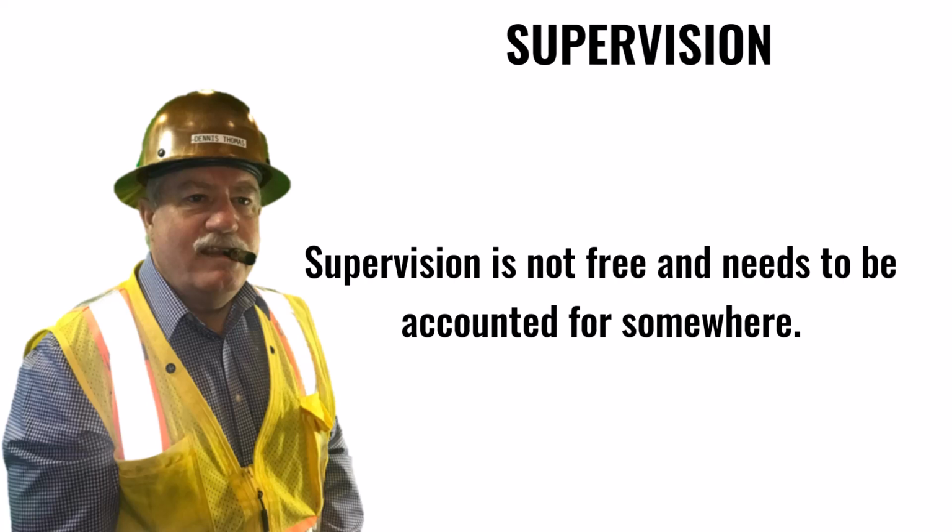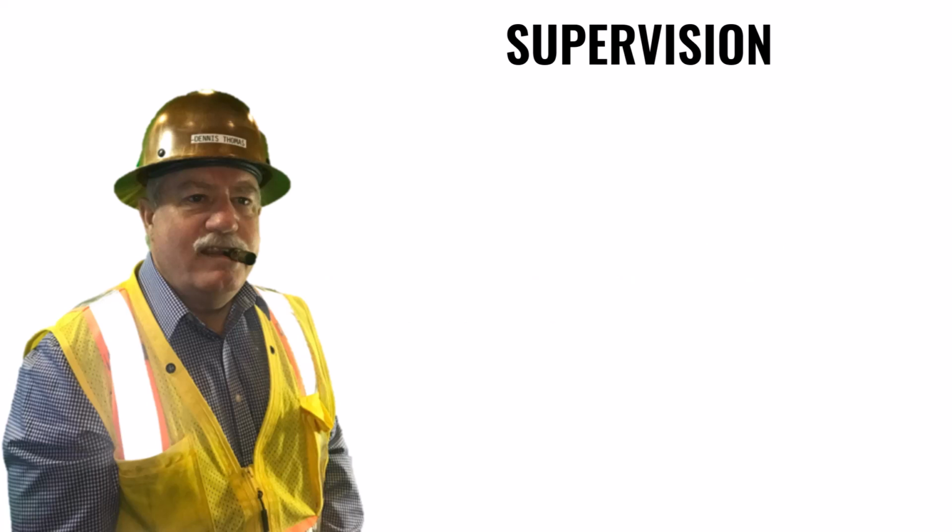Some companies include the cost of supervision in overhead by just including the supervisor's annual salary in their overhead calculation or a portion of it. Others add it to the direct job expenses as a budget based on the labor hours on the project and how much supervision they expect to incur to supervise it.